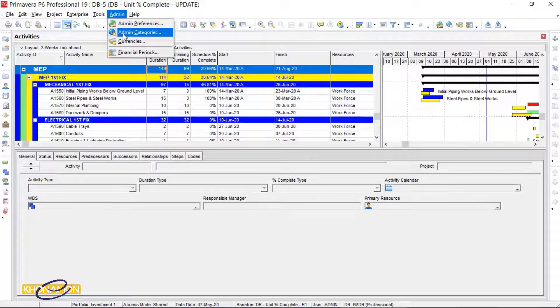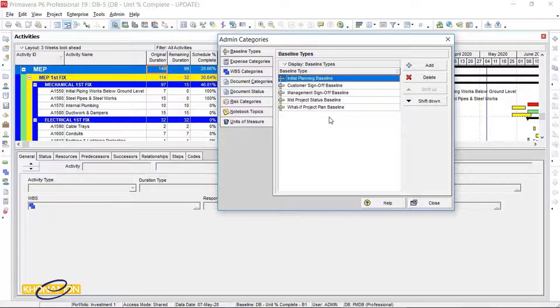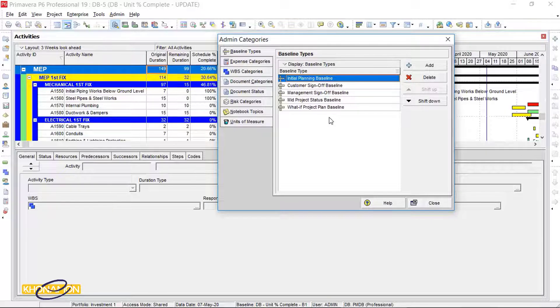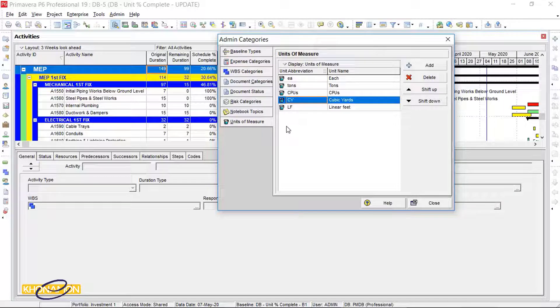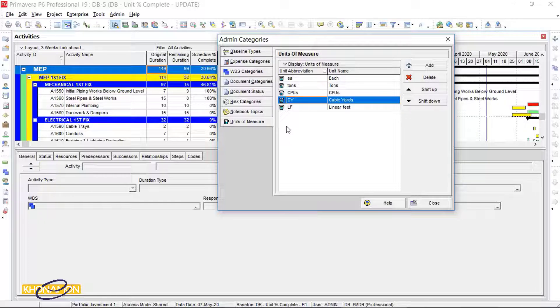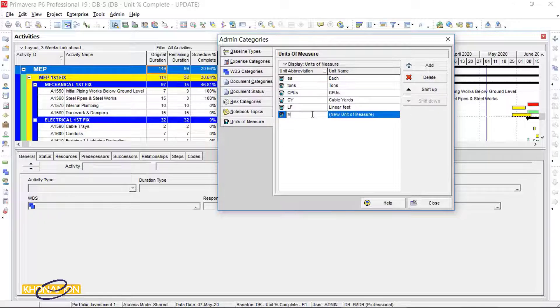Admin Categories. In Admin Categories, all tabs are default. We don't change them. In Units of Measure tab, it is clear from its name. But let me give you an example. We have concreting. The measurement you need for concrete is cubic meters. We can add it in this section.